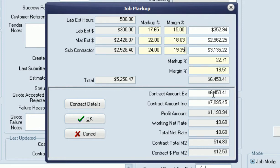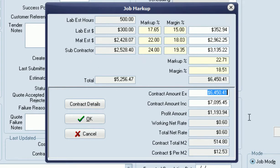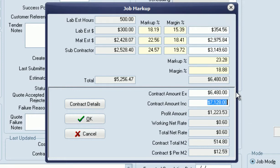the system's going to increase or decrease these margins against each of these areas to maintain the balanced integrity of what we're trying to recover as per the new contract figure. If I put in $6,480 and press tab, all of these have gone up a slight amount. The reason we're now putting more emphasis on tracking at this level is that if I went back at an estimate level—let's say this was a quote we haven't won yet or the client came back and pushed us around—